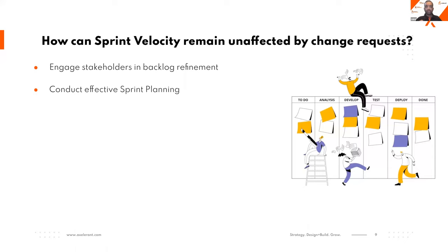Conduct effective sprint planning. Sprint planning should not include the grooming work. It should have groomed tickets, where the team will think how they can divide these tasks into small pieces. They can think about who will do what, and when.